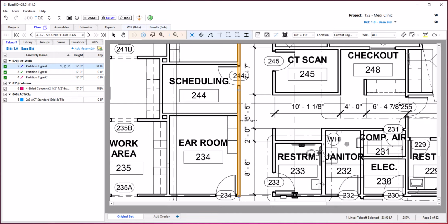Now that I've selected that, I can count other 3 5/8 walls with one click like this. Anytime I move the cursor over it, I'm not pressing the key in any way, it highlights that, showing what it's going to count if I click it once. If I do click this wall, it stays selected. You'll notice that once I've locked onto the 3 5/8 walls, I can move over the 8-inch walls and it cannot see this wall over here.